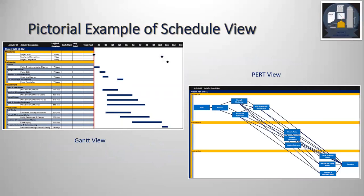Looking at the pictorial example of the schedule view: on the left side we have the Gantt view with the columns explained earlier. We see different levels — Level 1 in the yellow bar, with milestones, Engineering, Procurement and Construction. Within Engineering there are disciplines, and Procurement and Construction are further broken down into activities. On the right side, bars and diamond shapes describe the schedule — diamond shapes are milestones, bars are activities with a certain length based on duration. In some cases one activity starts after another completes, while in others there are overlaps.